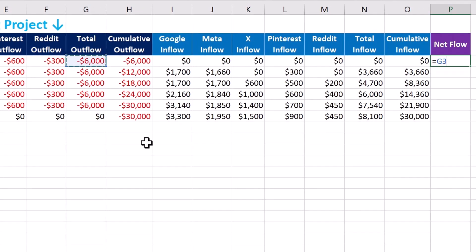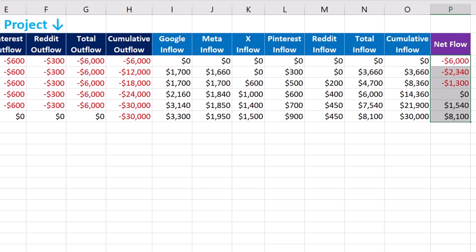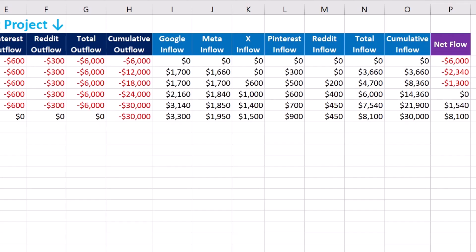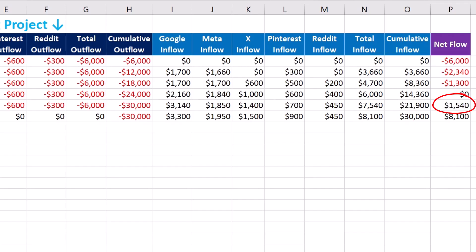Finally, we focus on net flow, which is the sum of total outflow and inflow. The formula for week 1 is replicated for the following weeks. In week 1, there is no inflow and we have a net flow of minus $6,000. In weeks 2 and 3, inflows begin to arrive so net flow gradually improves. Week 4 inflows hit $6,000, balancing out the outflow for a net flow of zero. In week 5 net flow further improves, and in week 6 we observe a significant positive net flow of $8,100, proving that revenue continues to come in after the campaign ends.